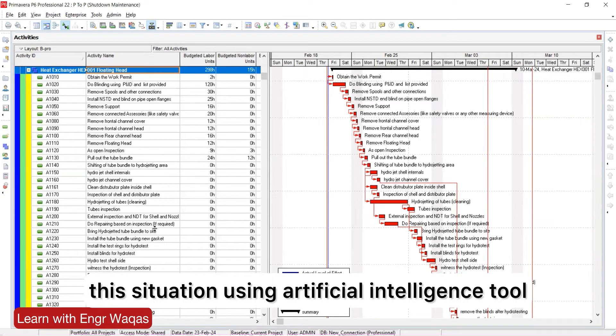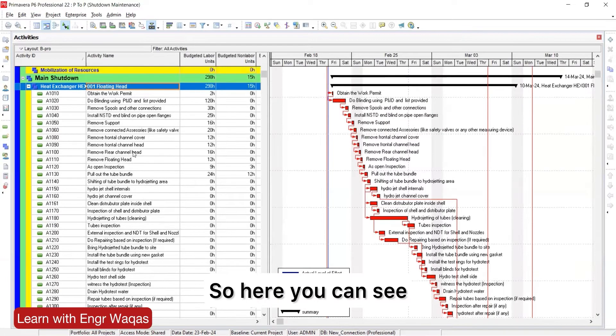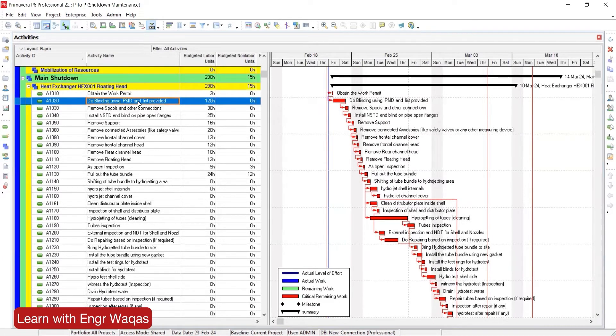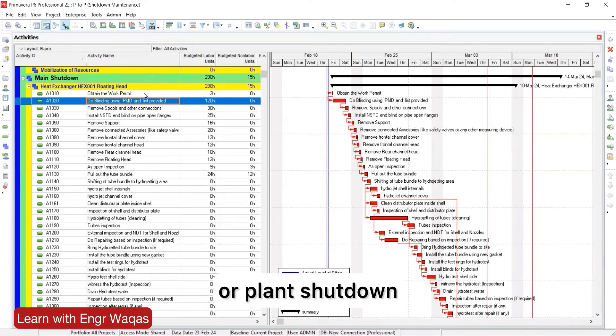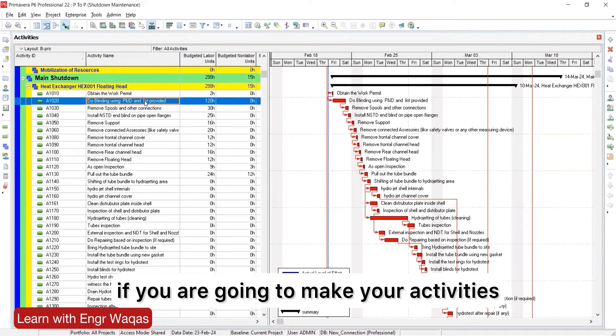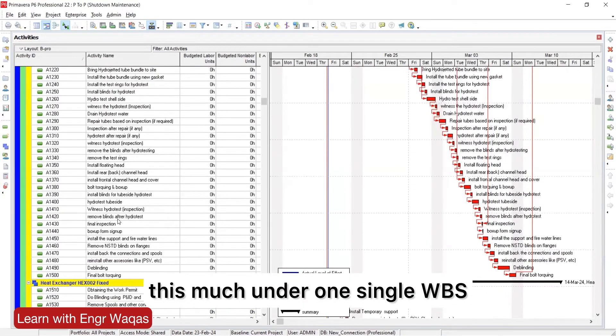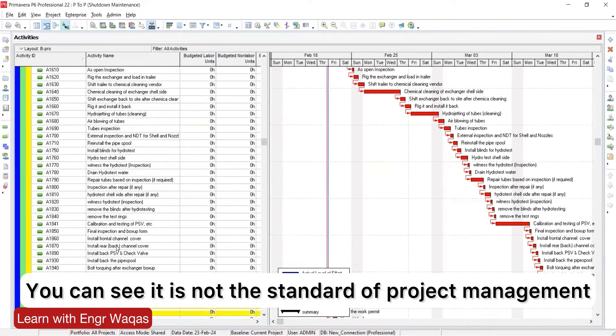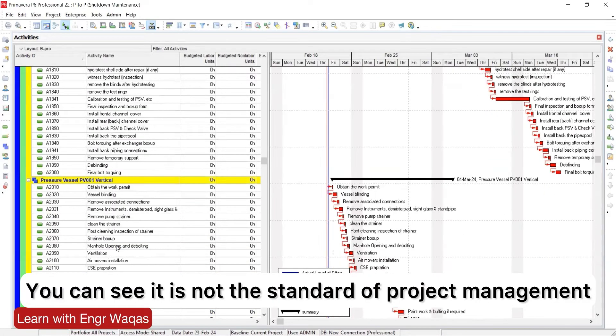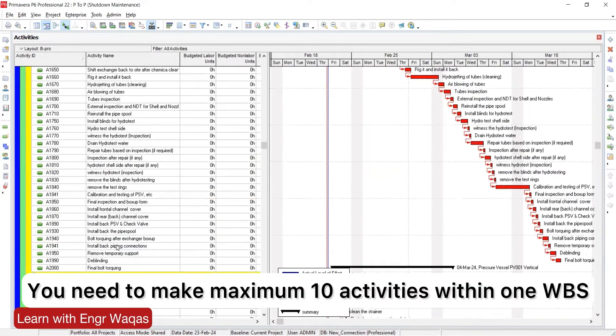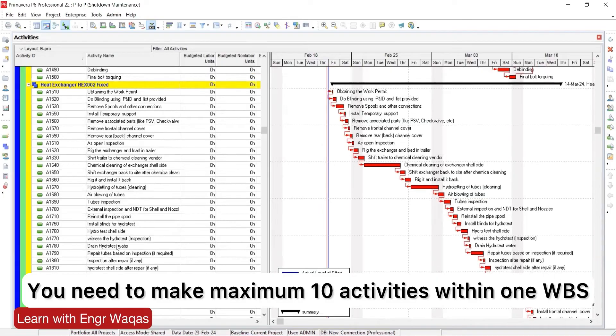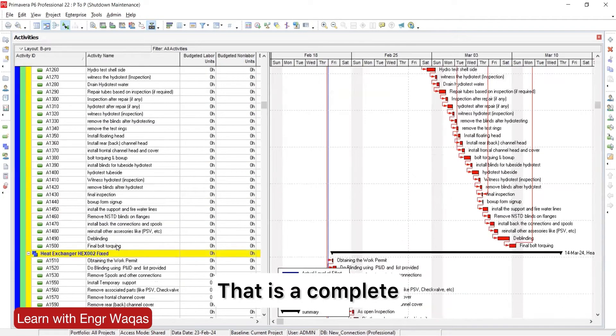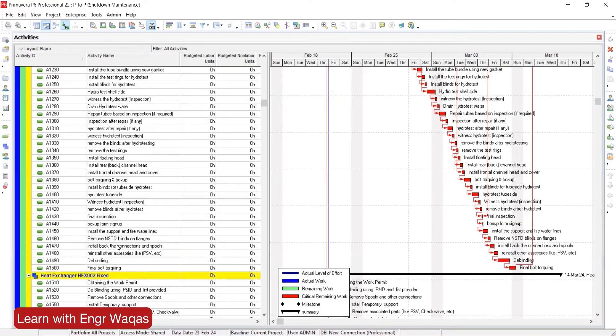Here you can see that as per project management standards, whether you're working on an EPC project or plant shutdown, it looks not good if you're going to make this many activities under one single WBS. This is not the standard of project management. You need to make maximum 10 activities within one WBS. That is complete and good project planning best practice.